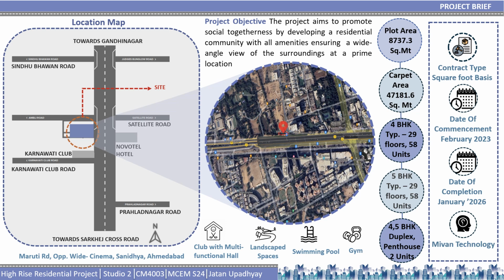The major amenities of the project are a club with a multifunctional hall, landscaped spaces, a swimming pool, and gym space. The project contract type is square foot basis. The date of commencement of the project is February 2023. The estimated date of completion is January 2026.